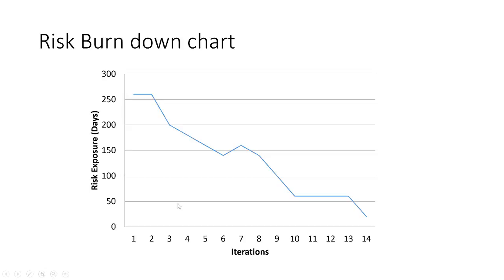Now, you would plot that on a risk burn down chart. This is like at the end of the sprint, or end of the project. But say we're at sprint number 5. Well, we've passed the milestone for some of these risks to have happened, but we still have 150 days worth of risks that could happen. We could be as much as 150 days behind. By having this, you're able to look at it and go, wow, I can tell the risk associated with what we're doing.